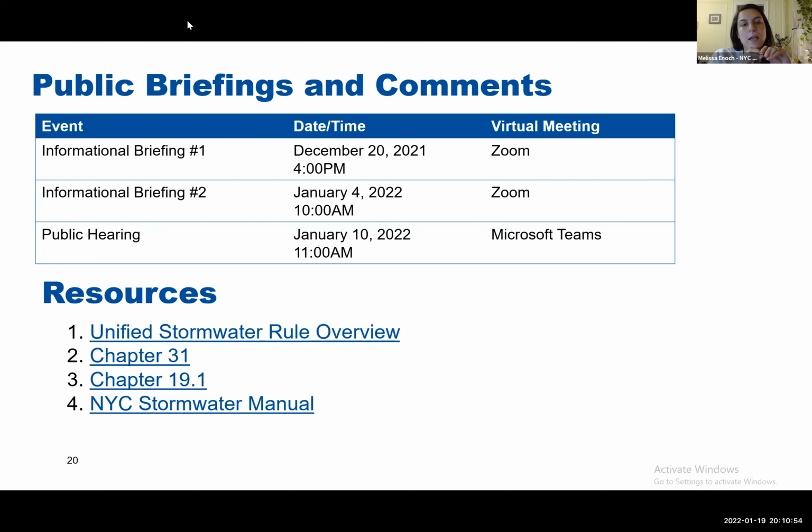Awesome questions. Sites that are currently in construction have to comply with today's rules. And today's rules are, if you're disturbing greater than 1 acre, you have to submit the stormwater construction permit to DEP. And then if you trigger a site connection, which I'm guessing that one does, you have to comply with the 2012 stormwater rule. So there are existing regulations that I covered, I think in a slide. Those sites, those are in place today. So the new requirements, they do not have to comply with those. If they've already started construction, they're past the point.